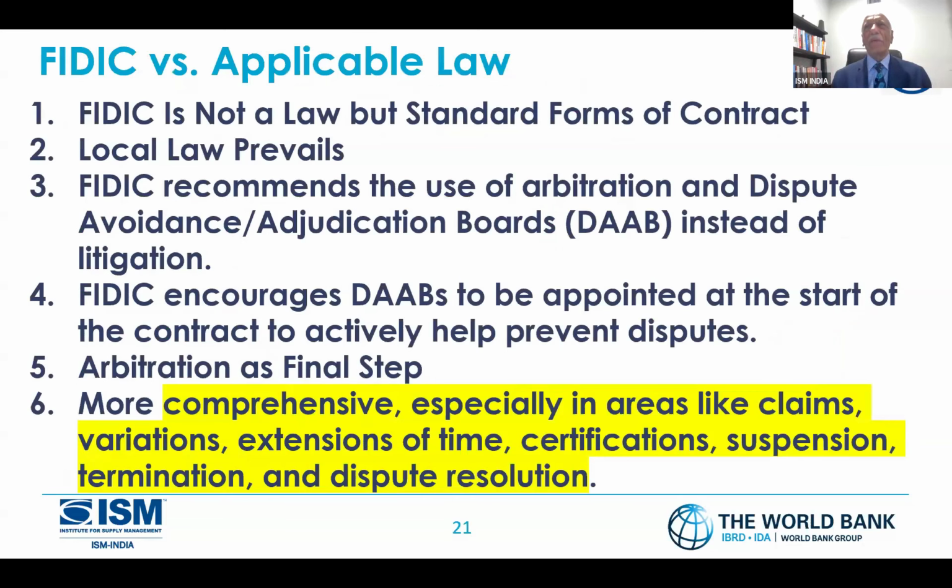Now, FIDIC versus applicable law. The question comes, which law is applicable when it comes to FIDIC? FIDIC is a good thing, but it doesn't stand above the applicable law. That part has to be very clear. FIDIC is not a law. It's not a universal law for all the countries. Not in the least. It's a standard form of contract. The local law prevails. There is no second thought about it.